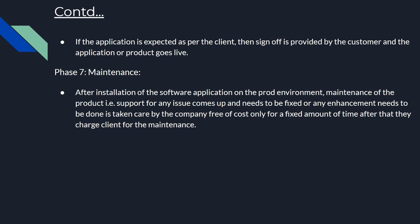After installation on the production environment, maintenance begins — supporting any issues that come up and handling enhancements. The company provides maintenance free of cost for a fixed period of time, after which the business partner charges the client for ongoing maintenance. For example, if the contract is for one year of development plus six months of free maintenance, after those six months the client is charged for further maintenance support.